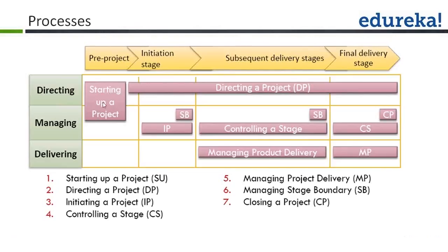The first process is starting up a project process, which is performed during pre-project work. The purpose of this process is to check the viability of the business case and to prevent the poorly conceived projects from getting initiated.